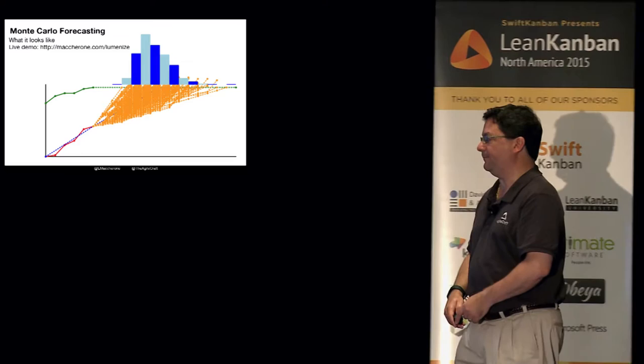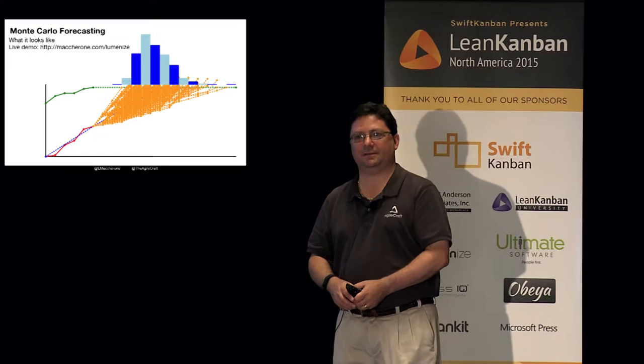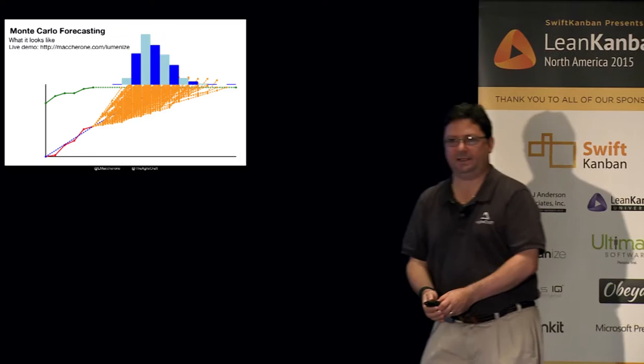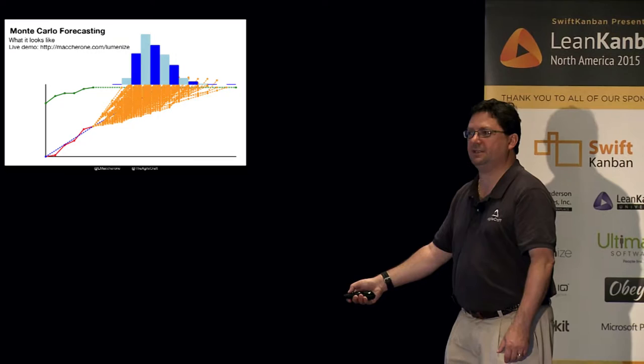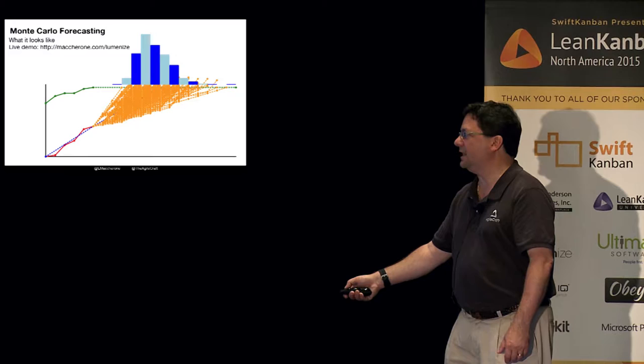What if we had a five-sided dice? Imagine a five-sided dice. If you roll a one on that dice, that corresponds to this shallowest slope right here. If you roll a two, that corresponds to this slope. If you roll a three, that slope, a four, and a five. So let's get unlucky, and let's roll a five, this last shallow slope. We're basically just extending this slope right here. We roll a five on the dice.